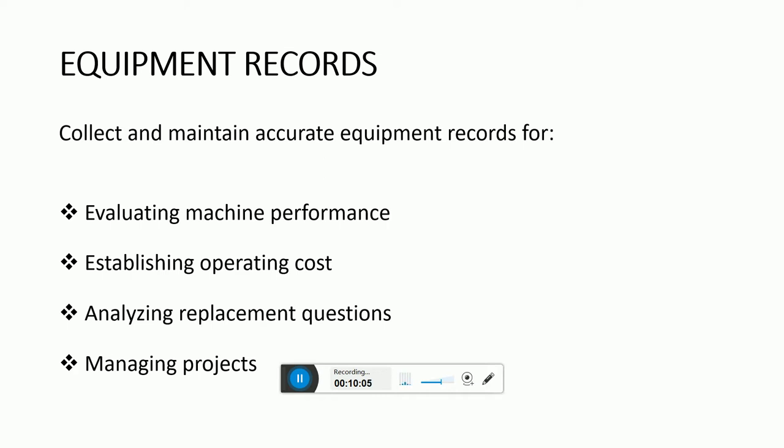The input for either type of system can be easily incorporated into regular personnel timekeeping reports, with machine time and operator time being reported together.